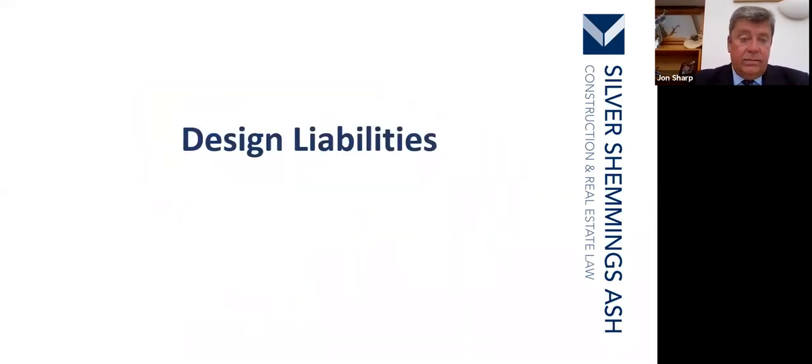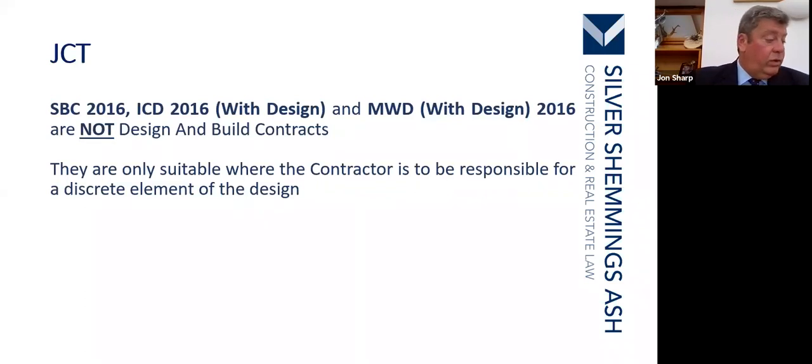Design liabilities. Standard Build Contract 2016, Intermediate Contracts with Design 2016, and Minor Works Design are not design and build contracts.